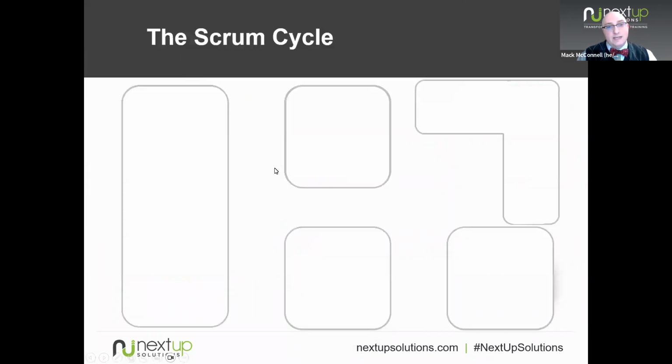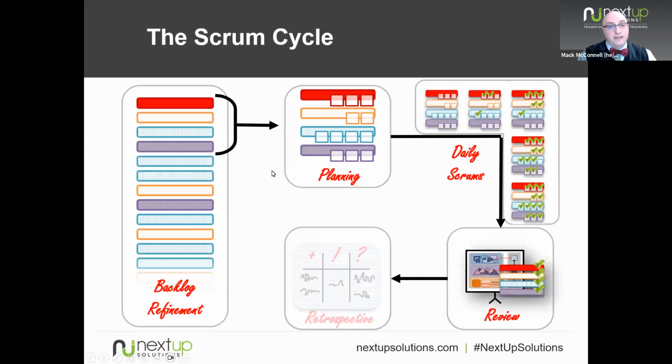And then the Scrum framework itself is really 5 activities that go on every sprint. Backlog refinement is where the product owner and developers have discussions about work that might happen in some future sprint to make sure that we understand it very well before the team agrees to start it in a sprint. They have the same understanding of what done means, all those kind of things. And backlog refinement goes on kind of all the time, whenever it makes sense to a particular team. Some teams do it as an official meeting halfway through a sprint. Other teams do it just as smaller conversations that they have a little bit every day. Any of those are fine. What really matters is that enough backlog refinement is happening and that it's effective.